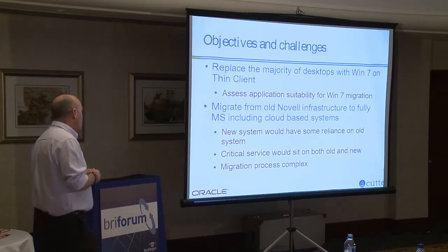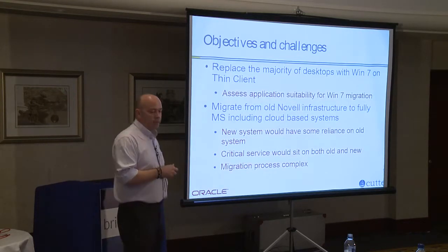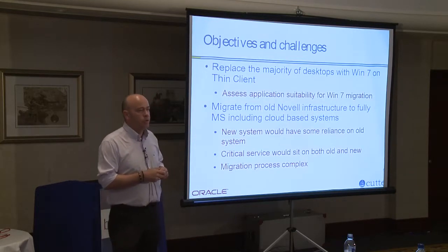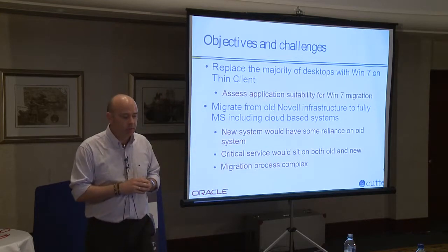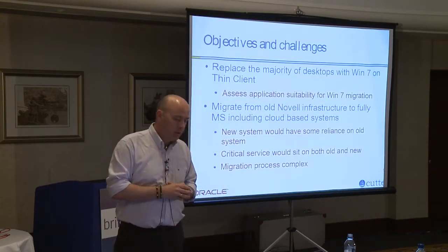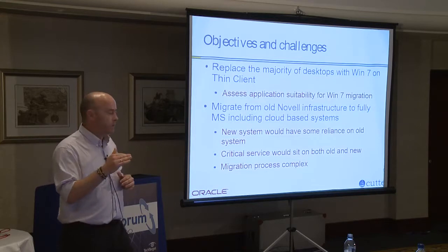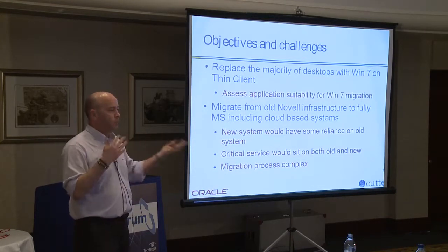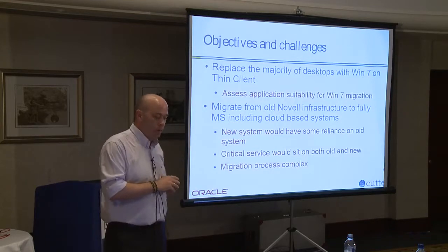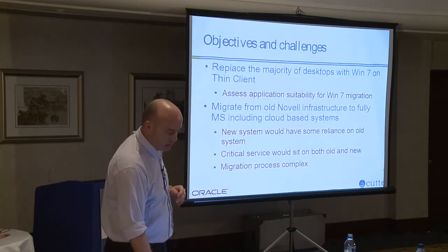The migration process is complex, and because of the size of the organisation, it can't all be done at once as well. So we had to take that into account on how we did things. And again, some of the flexibility that's offered by the Oracle VDI stack allowed us to sit on both environments and provide desktops in both environments while they went through that migration process and did some of their testing as well.